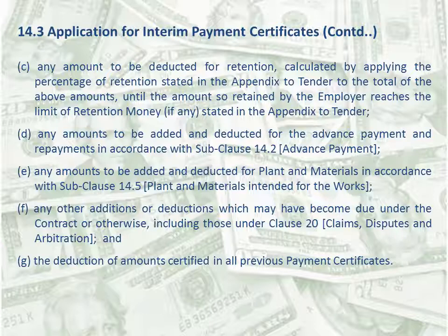It is important to keep the specified order in which the interim payment application is to be calculated. As an example, price escalation under subclause 13.8 is calculated before the cost of materials or materials on site, because this will include inflation, as any invoice cost will be the cost at the current date of purchase. Though the contractor is entitled to finance charges for delayed payments under subclause 14.8, delayed payments, the contractor can include a calculation of any finance charges due under subclause 14.3 F.